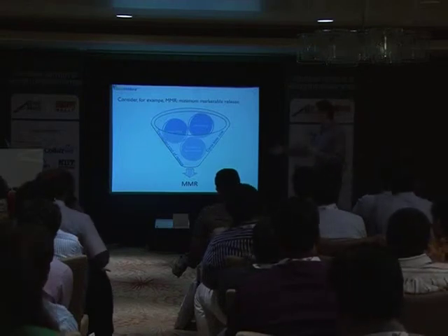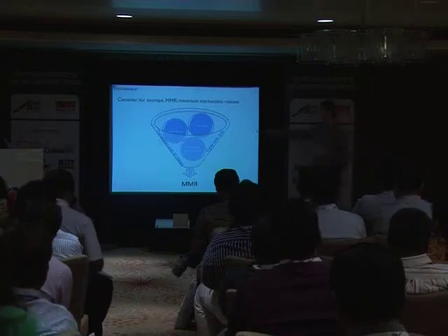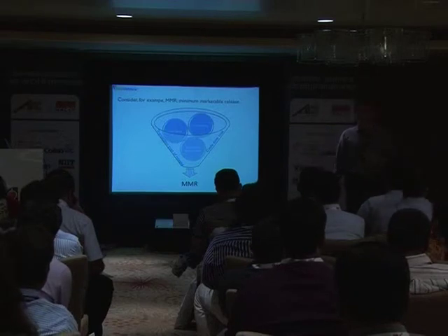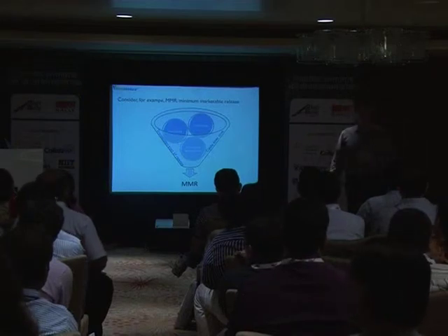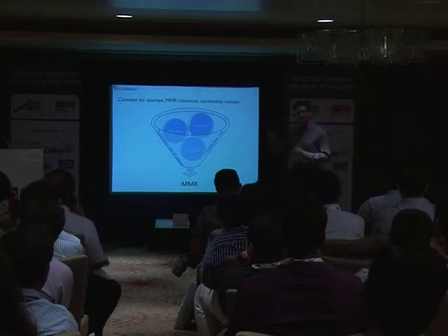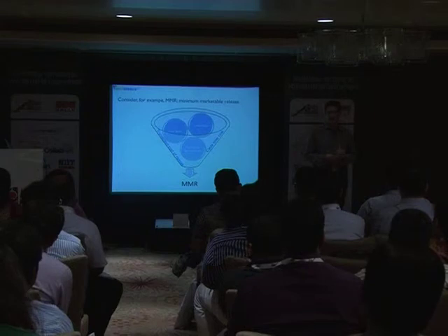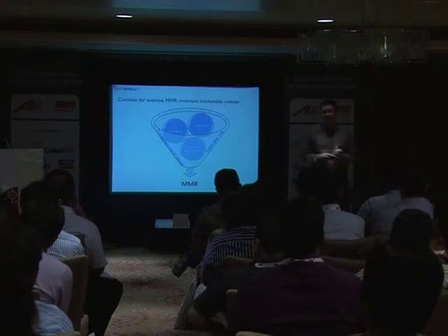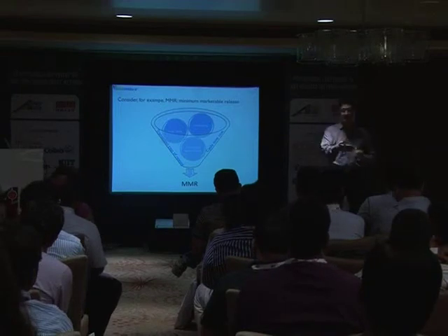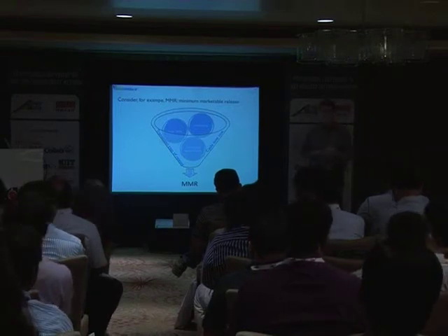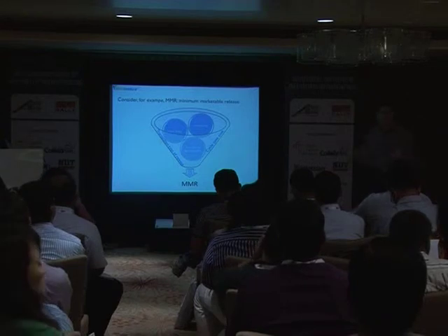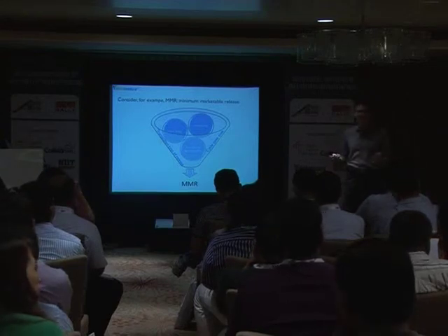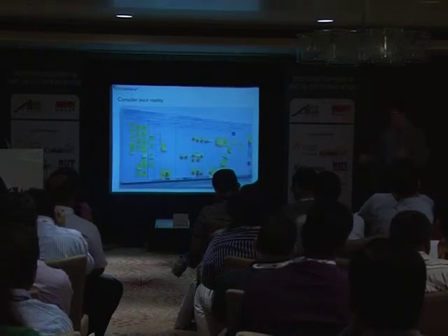And what that means is what we're going to do to determine our MMR is to consider the transaction cost of the release and the cost of my cycle time. Why is that important? Because we're talking about money in the end. So maybe doing deliveries after each time box, the sprint or whatever it is, can become a little too costly. And we are actually delivering something that is not really ready for the customer, or that the customer isn't ready to take. So then why do it? It doesn't make sense from the economic standpoint to do it. From the functional standpoint, yes. From the process standpoint, yes. From the economic standpoint, question mark. Okay? So we have to start taking that into account.